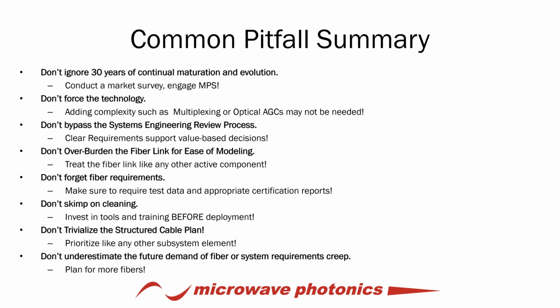Don't forget the fiber requirements. Make sure that you embed those within your system spec requirements, that you're flowing out requirements to your vendor base, that you're not buying fiber cables based on lowest cost. That's like buying a Ferrari and putting the used low-cost tires on it.